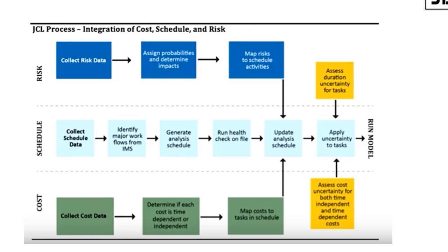So we collect the risk data, we collect the schedule data, add the whole lot together. We do a summary schedule. You know, there's no way in God's green earth that you can use a 50,000 line integrated master schedule out of all of your disciplines and run a risk analysis on it. So a big part of my job when I go and do QRAs for companies, I would sit down with the planner, the scheduler, the project manager, the risk manager about 2-3 days before the actual workshop session. And then they go through the pain of cost loading that schedule. First of all, making a high-level schedule, not just a summary, but a high-level schedule that still shows the deterministic critical path through the schedule. But then at a higher level that we cost load, we get our control accounts all sorted out. And you can imagine, you guys who have been in the game for a long time, there's a bit of pain on their part.